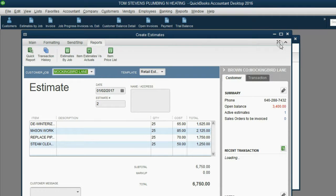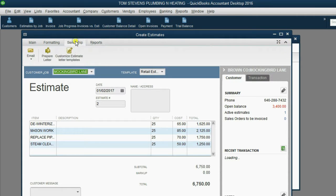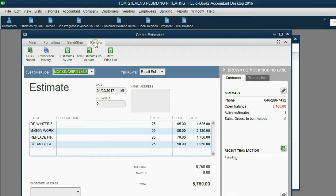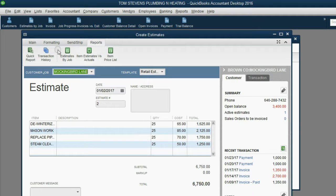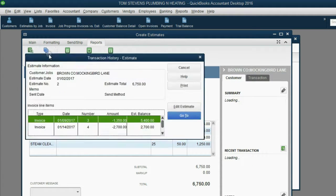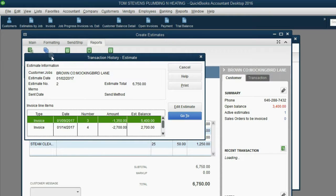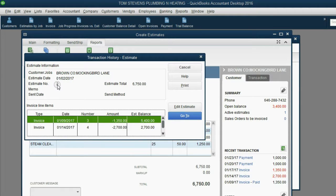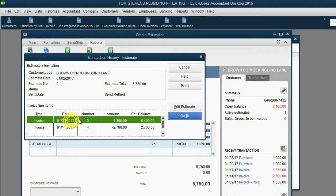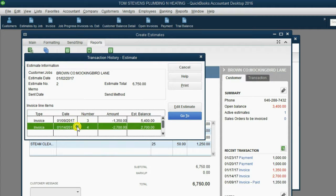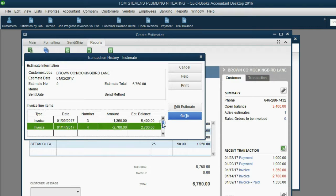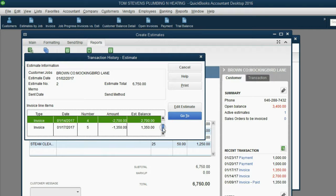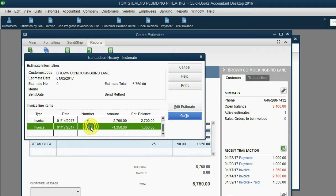When we double-click, we see that the ribbon is already open, and we choose the Reports tab in the ribbon to find transaction history. Notice, this particular estimate number 2 has been billed by invoice number 3, has been billed by invoice number 4, and, if you scroll down, has been billed by invoice number 5.